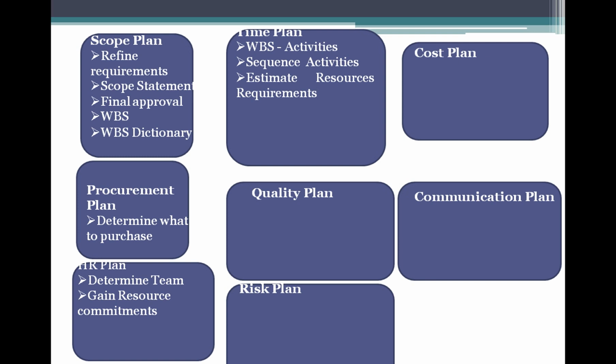So he estimated what resources are required, what human resources are required, and the quantity of resources required for each activity. So he estimates the overall resource requirements. Then, once he has the estimated resources for each activity, he estimates the activity duration.